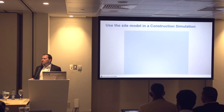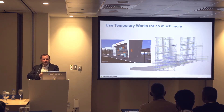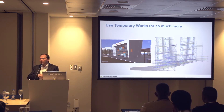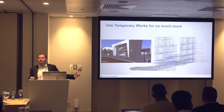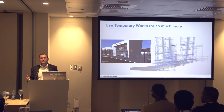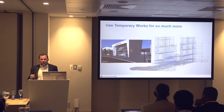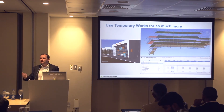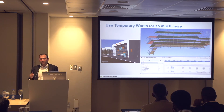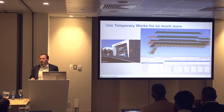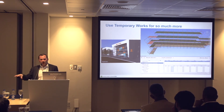Who works with temporary works? One of the things we're seeing more and more is people modelling temporary works. For example, this is where we've taken a scaffold and done a structural analysis on it — it could be a wind analysis — just making sure there are no health and safety issues on site. We can also use this to quantify it on site, so the site manager can make sure they have the appropriate amount of materials before erecting a scaffold. The drag and drop will show you how many spindles, how many pipes, and how many boards you've got.